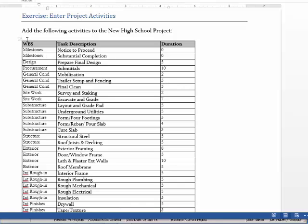The first column on your left is your WBS. The middle column is the task description. And then the right column is the duration.